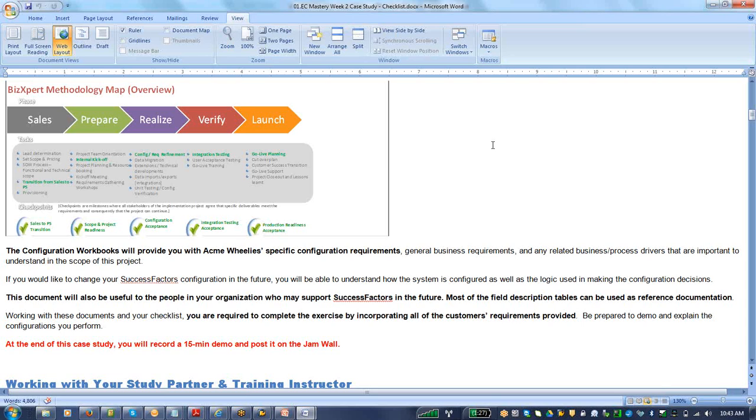If you are implementing only one module, it is done very quickly over a period of 3 months. If it's multiple modules, then probably up to 6 months. So it again depends on how soon they want to go live, and it depends on the business requirement. If they are in a hurry, then it can be done in a hurry as well. And if they have flexibility, then it can stretch up to 6 months.